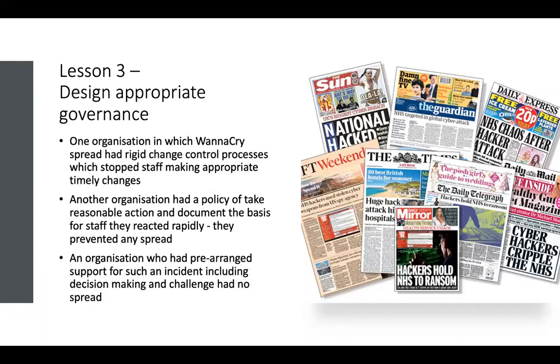Another organization had that extraordinary sort of planning in place, and they basically said, if you can justify why the governance is not fit for purpose, then document what you're going to do, why you're going to do it, and take a decision. They very rapidly decided that at a sort of medium management level, they were going to do things and inform people of what they'd done and why in retrospect, so it didn't hold up decision making.